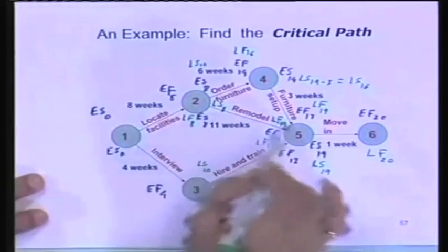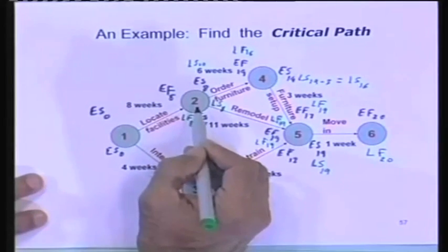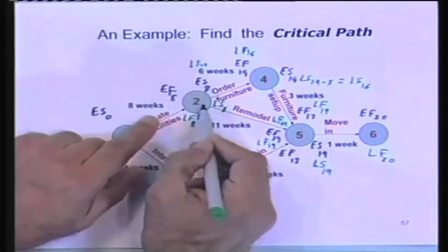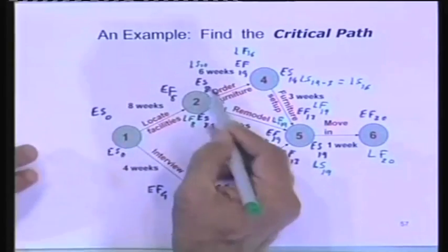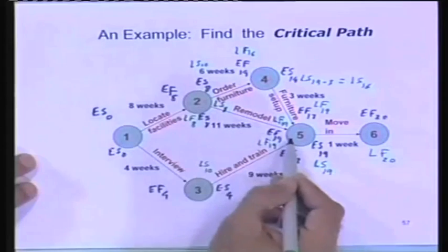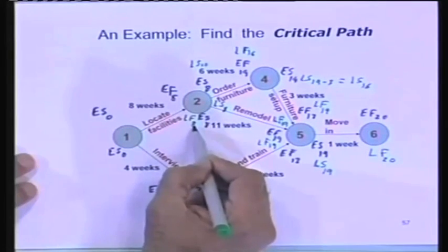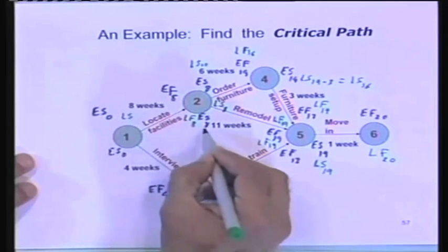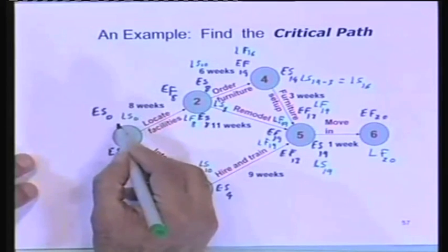Everything will be delayed. So I've done the backward calculation to make sure when the class is going to start, and I start backward planning from that. The class is going to start at this point, and I find that if it goes beyond any of them, I can't finish at the latest start. That would just mean that this task will be ready, but the next will be delayed. So I finish this task by 8. What will be the latest start time for this? 8 minus 8 is going to be 0. I can't delay it anymore.